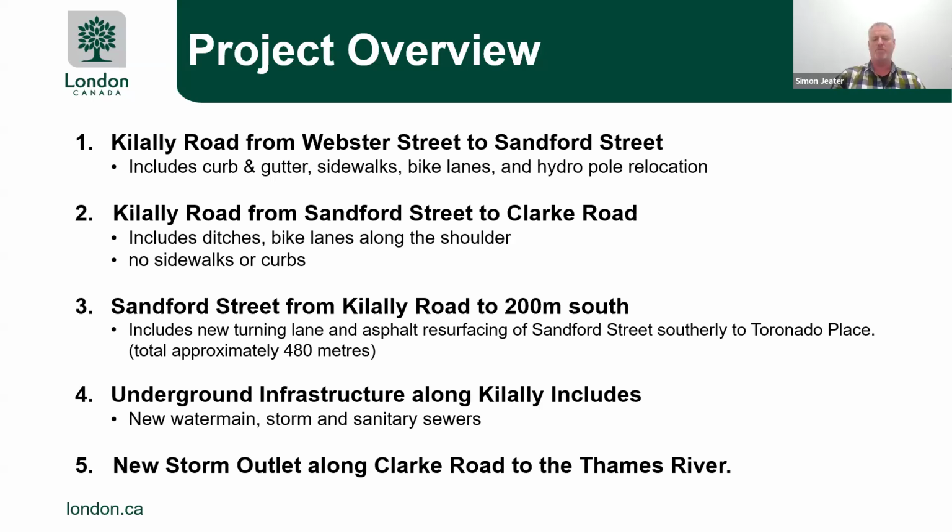There's also a section of Sanford Street, from about 200 meters south of Kilally Road, that's going to be realigned. We have acquired some land through there, so we're going to be pushing the road to a proper center line of road. Beyond that 200 meters, there's going to be some resurfacing down into Tornado Place for about 480 meters. Along Kilally Road itself, we're looking at new water mains, storm and sanitary sewers.